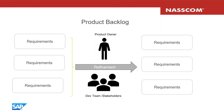Is Scrum a single silver bullet for all projects? It depends on the business need. For a purely maintenance project with ticketing systems like L1, L2, or L3 support with SLAs, a four-week Scrum won't work — you can't delay a high critical issue. But teams can still be agile. They can use Kanban and other flavors that help deliver faster and respond quickly, and still be agile.